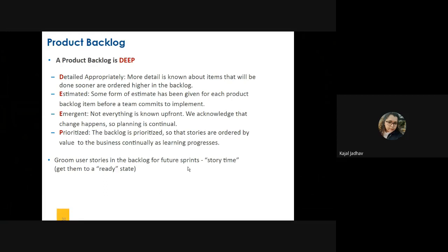Because we did not discuss this terminology, grooming sessions are the sessions conducted by business analysts. Whatever user story they have written to explain a product requirement, they include the development and test engineering team in that call. They explain what that user story is and what things we're going to cover as a part of it. Those sessions are referred to as grooming sessions, wherein the developers and the testing team come up with the doubts they have regarding that user story.